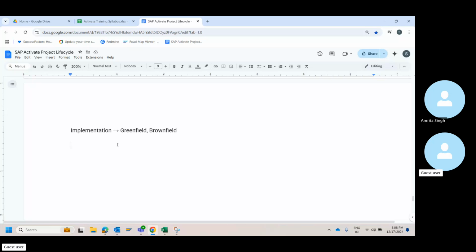When it comes to a greenfield, it's all about training the users from scratch for all the modules, and then you do it. In the other case, when it comes to brownfield, you're going to have users already using some processes in the system. Because of a change based on the project that you're doing, you're going to retrain them with the new set of processes, implement new changes, and then probably move on with the support project. So this is basically the difference between greenfield and brownfield.